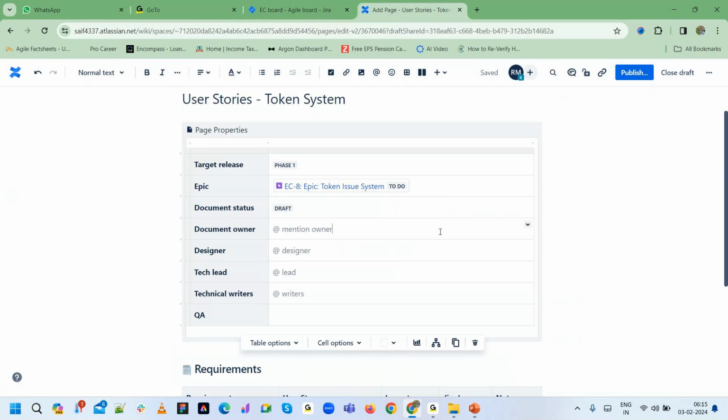Behind it there is a big logic: if you have insurance, if you are in the low income group, what is the age, depending upon the location, the currency, and many other factors, you are arriving at a fee. You have to write a big logic behind it. Naturally, it is a bit complex, correct? So naturally, you are going to give 8 story points for that.